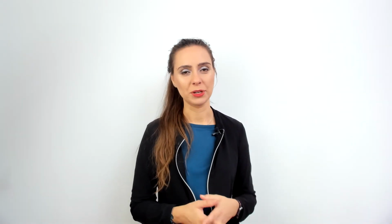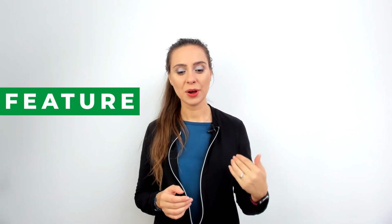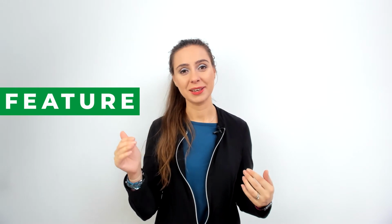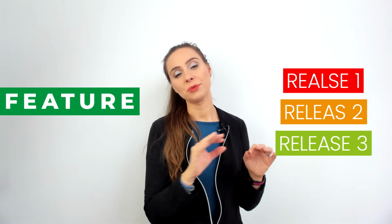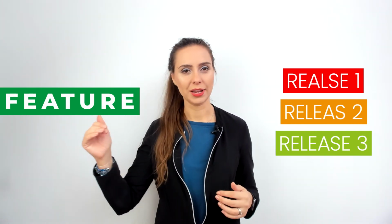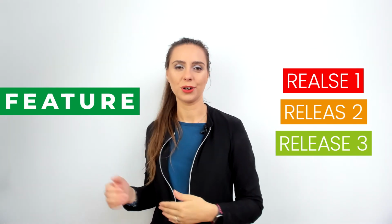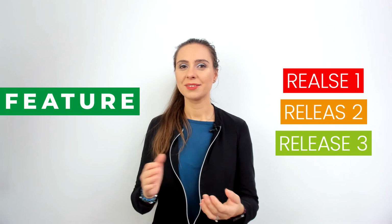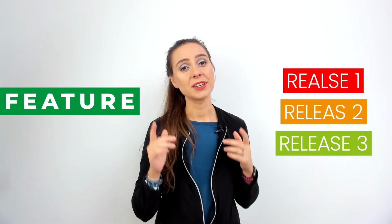And this usually comes after the impact mapping workshop, because you are going to have features identified from that workshop, and now you can prioritize them, the ones that you are going to release first, second, third, and the ones that will be released first, that is going to be your next major release. And eventually you can define what the intermediate releases are that you are going to have before that. So that's how you can replace the PBR with a workshop in which you define the product releases.